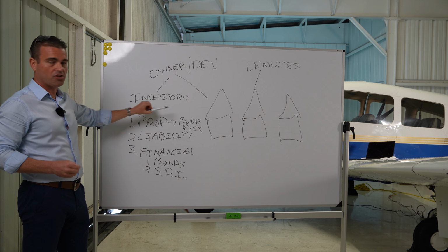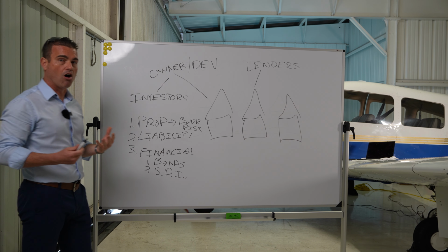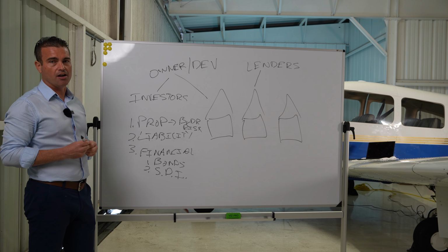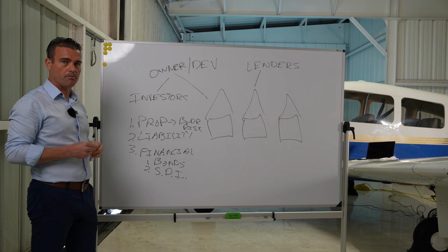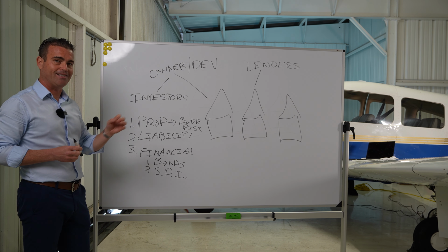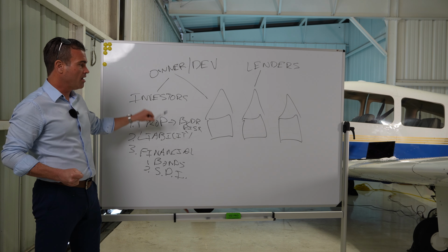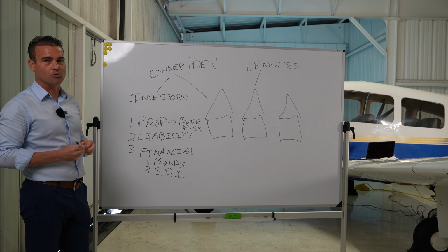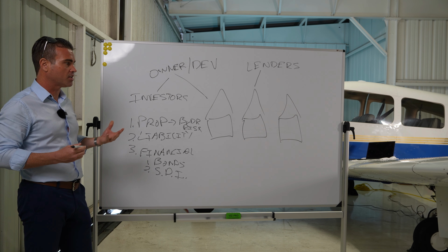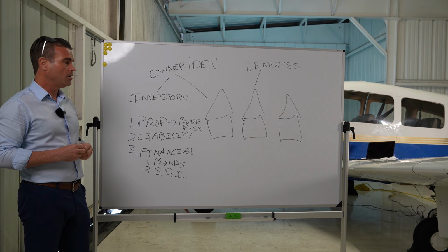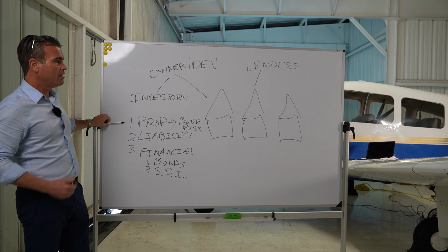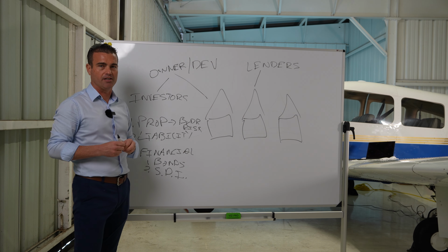What we do on these is we actually have to set limits. There's no typical hard or soft cost. There's somewhat of an industry standard, but what we do is we review the contracts. We work with whether it's your construction manager, your GC, and a lot of times the architects and engineers also to review the detailed construction contracts to make sure that the proper coverages are in the proper buckets. What do I mean? We've got hard costs, we have soft costs. Sometimes we even have some business income in there if it looks like there's going to be a BI exposure towards the end of the project, right? So we always want to make sure it's not as simple as just you've got a $100 million project, you go buy $100 million of insurance, right?